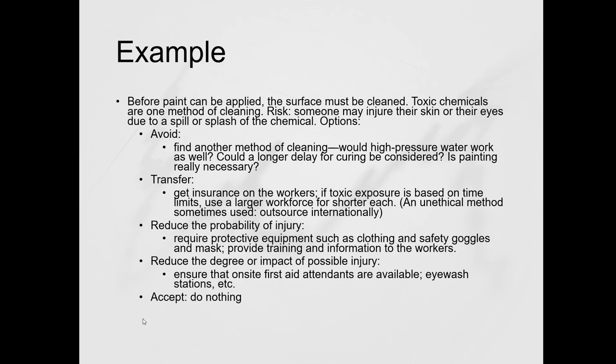Here are the options. Do we avoid it? Find another method of cleaning. Would high pressure water work as well? Could a longer delay for curing be considered? Is painting really necessary? In this specific option, this is pretty normal in the finishing stages of construction.